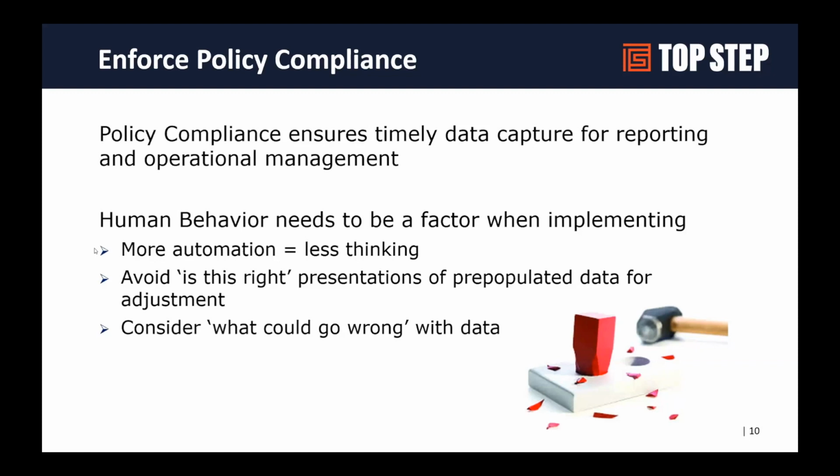So we've built some customizations for a few customers where we can actually store some of the audit data in reportable values so that we can see when it was submitted and when it was approved versus when it should have been, to be able to report on compliance and have that data available too. So that's one example of making sure that our systems are compliant.